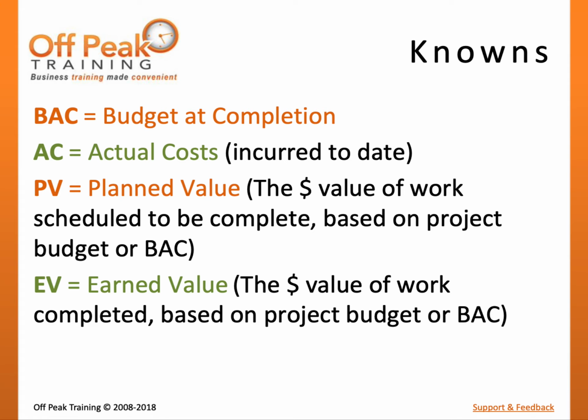The project team should also know the amount of money that has been spent on resource effort, materials, and equipment. This work performance data must be collected by the project management team. In earned value, we will call this actual cost and abbreviate it AC.